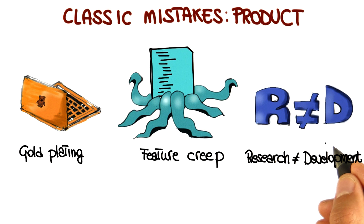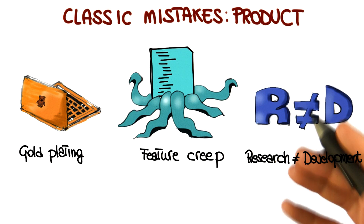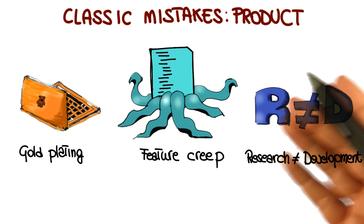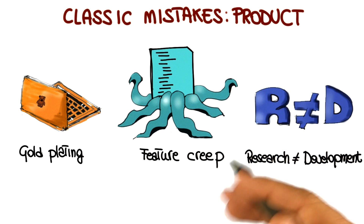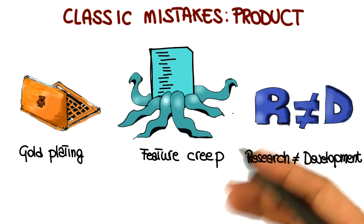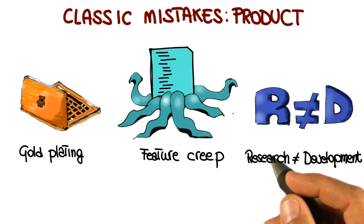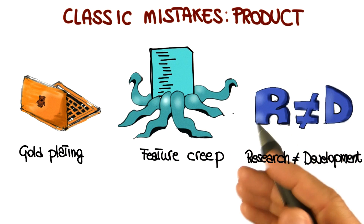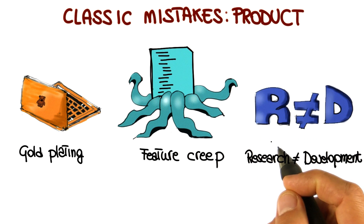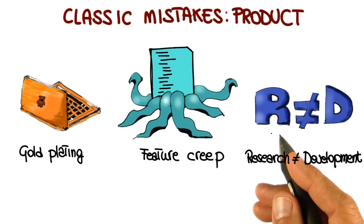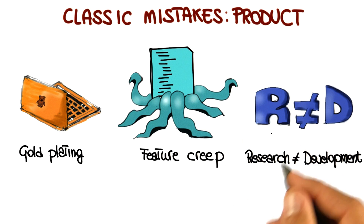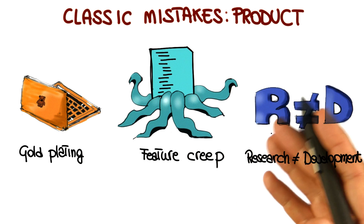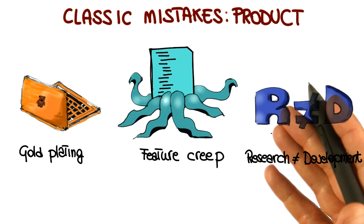Finally, if you're working on a project that strains the limits of computer science — for example, because you need to develop new algorithms or use new techniques — then that project might be more research than actual development, and therefore should be managed accordingly, for example by taking into account that it will have a highly unpredictable schedule.